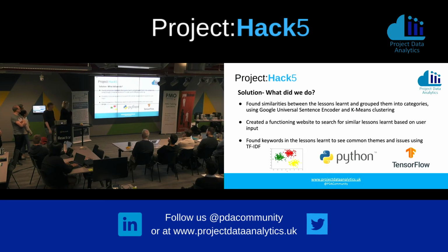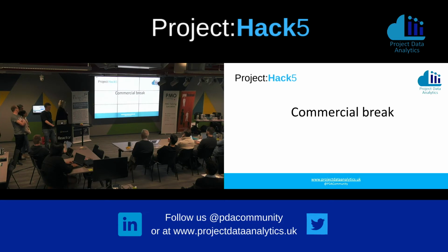So solutions, what did we do? We found similarities between the lessons learned and grouped them into categories using Google Universal Sentence Encoder and k-means clustering. We created a functioning database to search for similar lessons learned based on user input and found keywords in the lessons learned to see common themes and issues using TF-IDF in TensorFlow. So this is all done mostly in Python with a bit of website and Tableau.